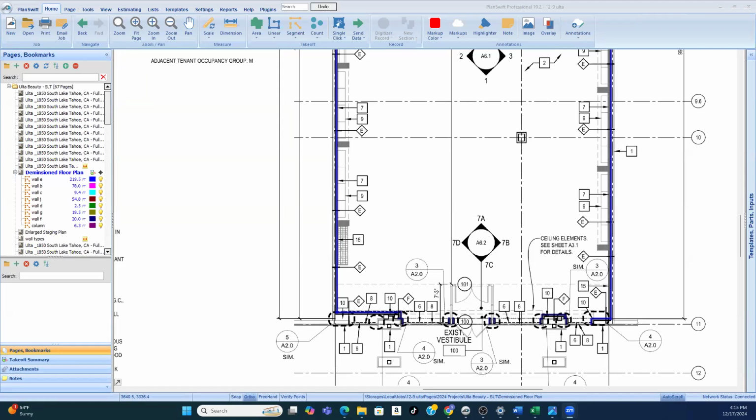But again, for electrical, their civil portion, whether it's residential or commercial, is in their whole electrical set. They don't have to go to the civil set. And the electrician's scope of work will be referenced in the civil set, but that's only for the plumber and for the HVAC person or for underground utilities or just to show how the pipes are running, but not for the electrician to use at all to do his estimate. Okay, so see how all of those fit? So how the A plans fit in?